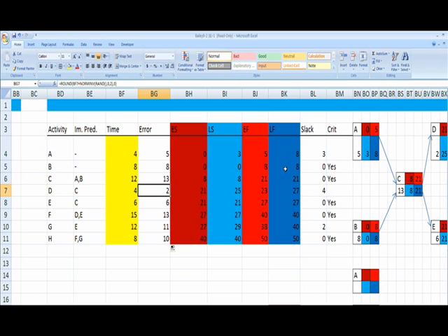So as you can see here, if I was to simulate my project and I give everything a plus or minus 2 days, A has, to do it realistic, at 5, a slack variable of 2. So if the time it takes was 5 days, you have a 2-day delay where you can basically delay it and there's no increase in your time.